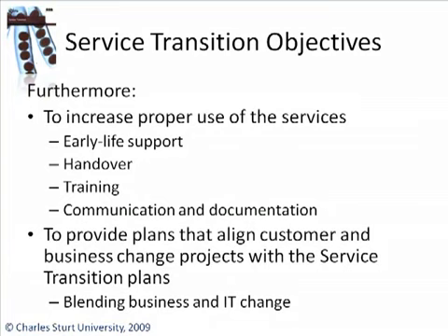Also, if the customer has some specific needs, for example, it's end of financial year, then typically the customer does not want IT to make changes to the financial systems, because if something goes wrong, they can't create their end of financial year reports. So the two need to come together. They need to inform each other, and hopefully also schedule their changes together in one overall schedule that is available to both IT and the business.